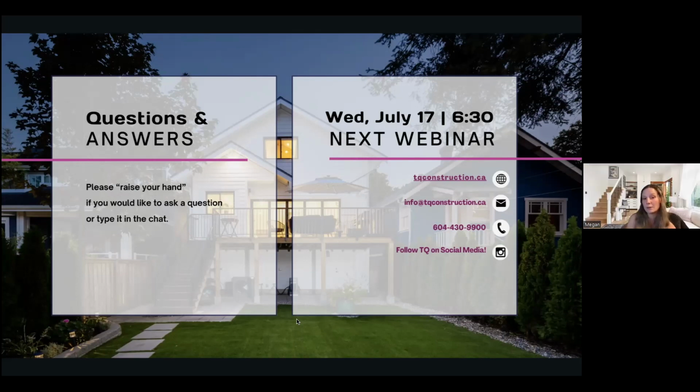Yeah. So tying in with that, we do manage all of that. We have a number of professionals that we work with on a regular basis, and we reach out to them at the appropriate times. For example, with building consultants and structural engineers, we don't necessarily reach out to them right at the very beginning because they want to have an idea of what our end goal is.